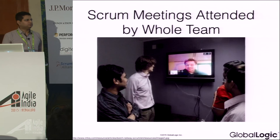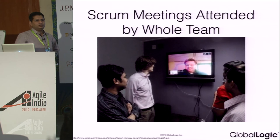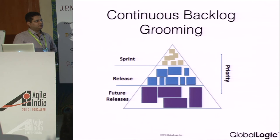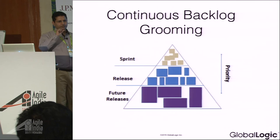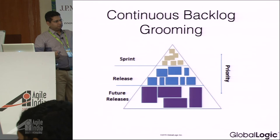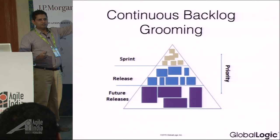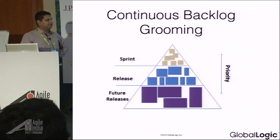Scrum meetings must be attended by the whole team — otherwise it's not going to work. Continuous backlog grooming is also taken from the previous points. As an epic comes in, it comes as a rock. You start drilling down and slicing it, and as it moves toward the sprint, it becomes smaller stories. This is a kind of backlog grooming iceberg — as it moves up, it becomes smaller and smaller. Backlog grooming is a very important thing in order to work in the distributed fashion and in opposite time zones.